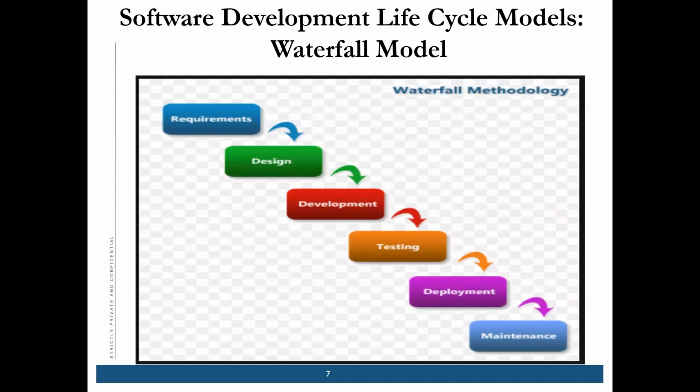Chavi, if someone asks where we use the waterfall model, in which kind of project, what's the answer? The answer is, for small projects, we can use it when the requirement is frozen, a fixed requirement, so there is no chaos in the requirement. Once the requirement is done, that means done, then the next step. So in small or not very complicated projects, you can use the waterfall model.